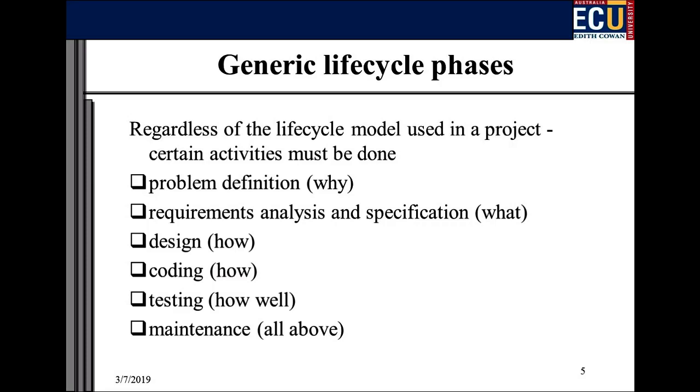You want to know this project's going to take 1 year. We've got 20 programmers on that. It's going to finish after exactly 1 year, and there's this next project that's waiting for them to start. You don't want to go, oh yeah, no, these guys have had more requirements, now this thing will be held up, or do we have to recruit more people? If you recruit more, you have to train them, lose money. It adds uncertainty.